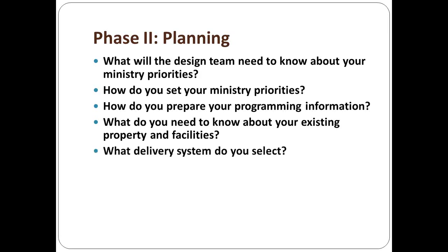What delivery system do you use? Well, you've got 3. And then variables of each of those 3, traditional, design-build, and construction management. Well, it depends on your risk versus reward decision. Do you want to save more money and gain more of the benefits from taking more risk, or would you rather cast all the risk for the cost and other things on the industry professional?